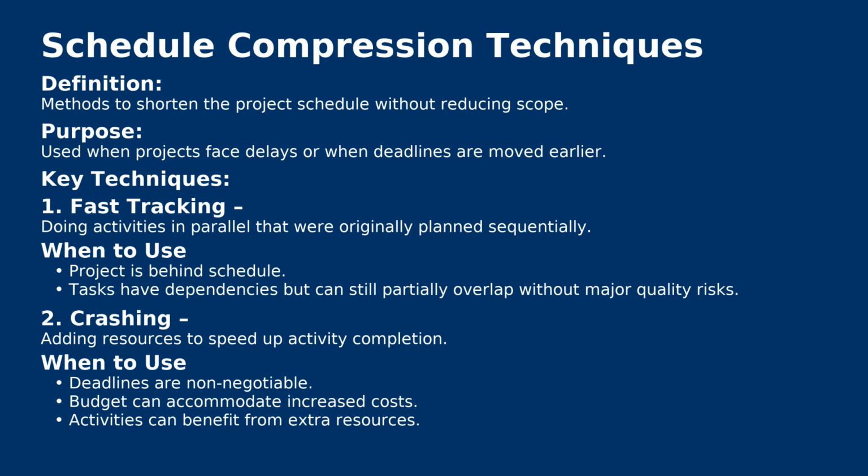Adding additional resources is something that you do as part of crashing. When we say resources, we refer to people, equipment. It could also be overtime to speed up the critical path activities. When do you use crashing? You can use it when the deadlines are not negotiable. The most important thing is crashing is always done at a cost. There is always an increased cost that will happen when you employ a crashing technique. Only when a budget can accommodate increased cost, you can employ a crashing technique.